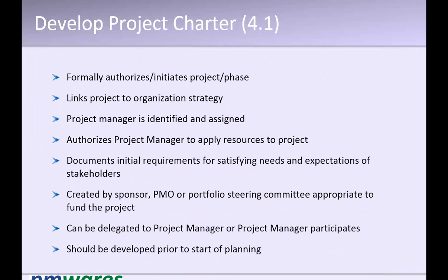Now look, is it under environmental factor? This is not an environmental factor because this is the reason for the project. Why has the project been triggered? Because there is a change in law. So your business case is the change in the mobile area. There is a change in law that every operator should provide mobile number portability, right? So that change in law has triggered the project, and it has become your business case.